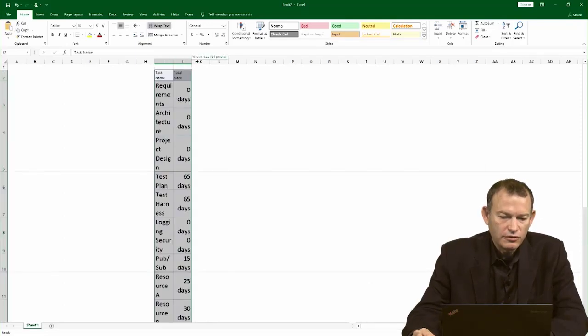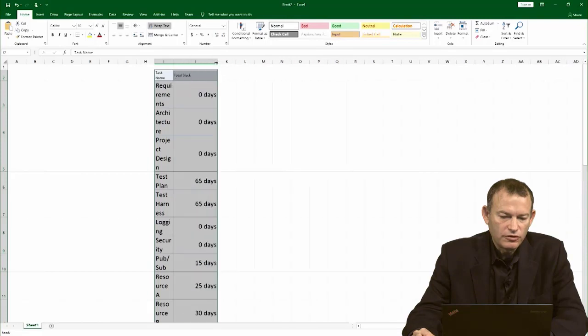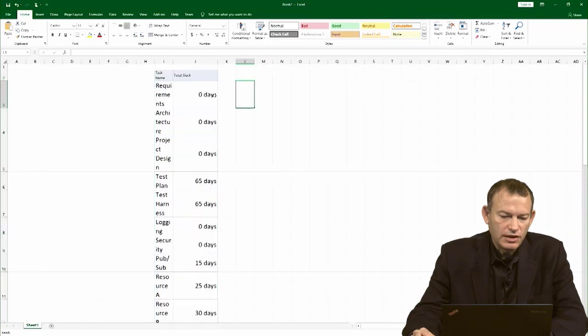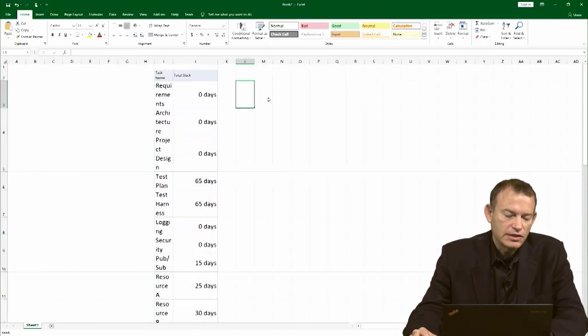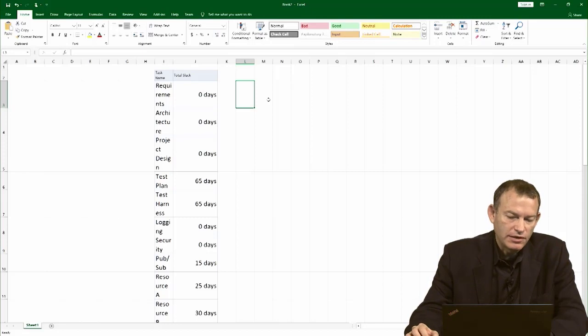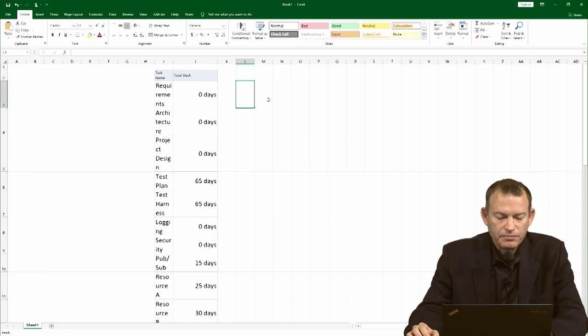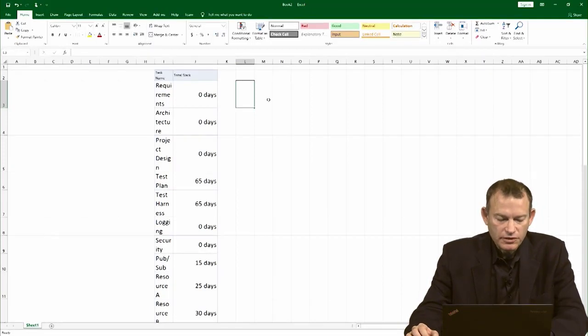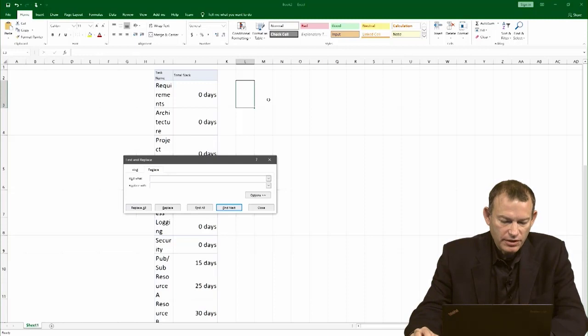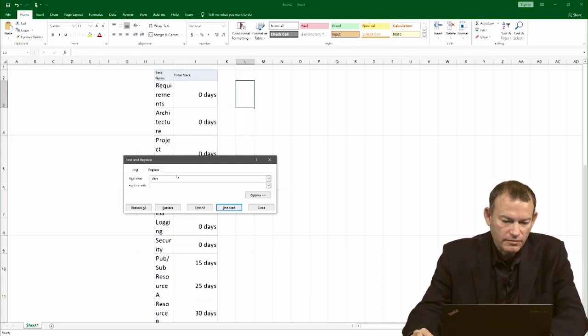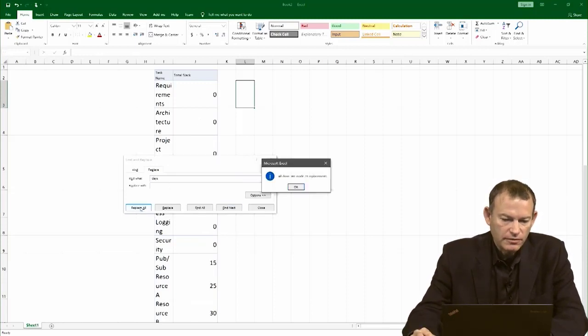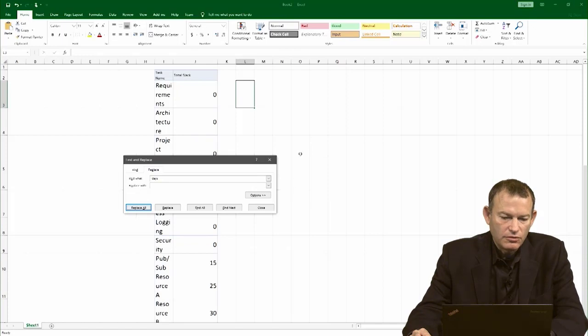As we've seen in other videos, MS Project in the paste adds the string 'space days', and that makes it into a string instead of a number. We need to fix that. So I'm going to replace space days with an empty string. Now it's all beautiful numbers.